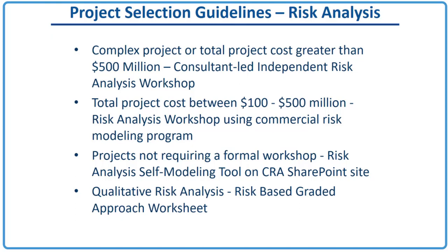In this case, the project manager and the district estimator can work together to load this self-modeling tool with the pertinent risk and run the model to get the same information as you would from the workshops. And the last is the qualitative risk analysis risk-based graded worksheet. This approach is used early on to determine the risky areas of a project, and this normally aids in the selection of the consultant that's best to manage the project.